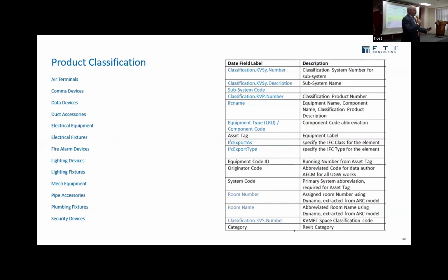But you as MRB should be able to create a requirement that you give to the contractor and that they deliver the information. But do not make the mistake that they made in Crossrail, where they said, we want everything. Don't go after the big stuff. The tip I will give you is the same tip I got. Put the data on a diet. And what I mean by that is collect the least amount of data possible. For each product, identify what data you actually need for an operation system and only collect that data, so that you don't have to collect and then check thousands and thousands of bits of data. So only collect the data you need, and then you have value.